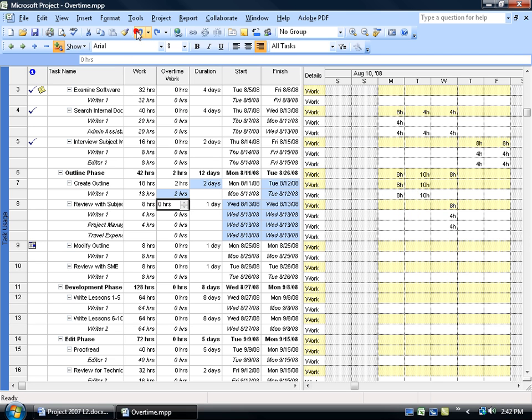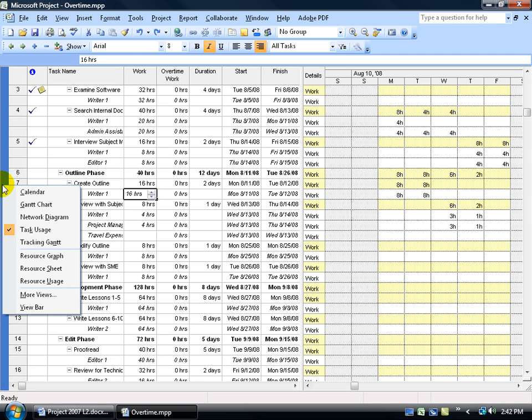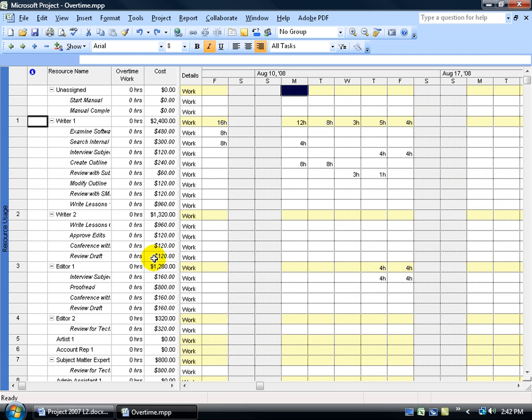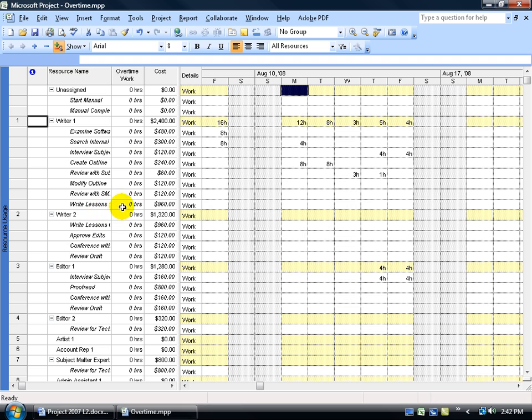Let's hit undo a couple of times so we can go back to where we were, the original 16 hours, because we want to go to another view. Right click on the collapse view bar and go down to the resource usage view. Instead of the task being listed with the resources underneath, now you have the resources with the task listed underneath. Rider 1 is assigned to all these resources.